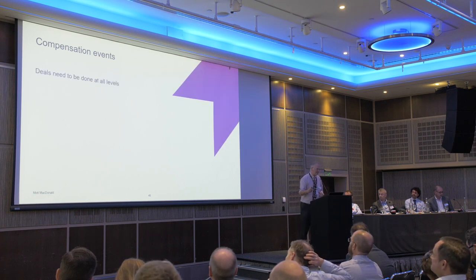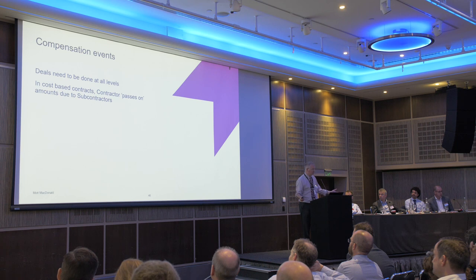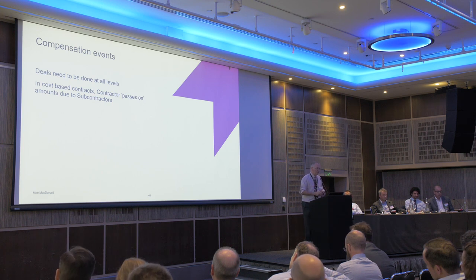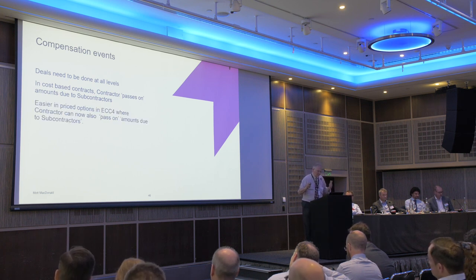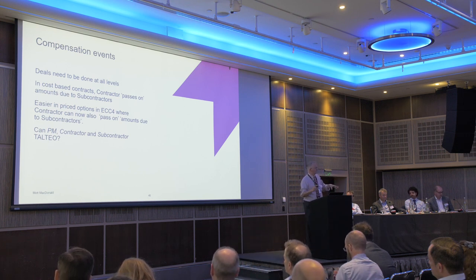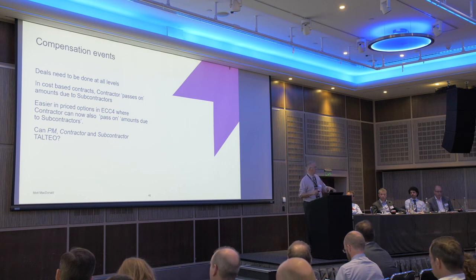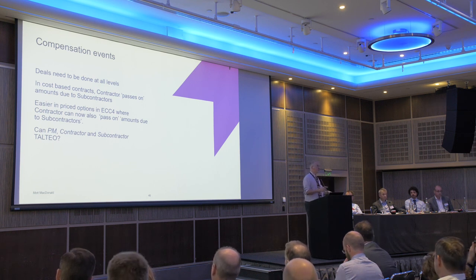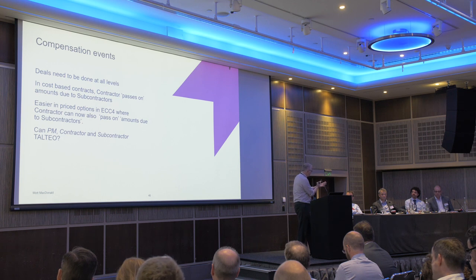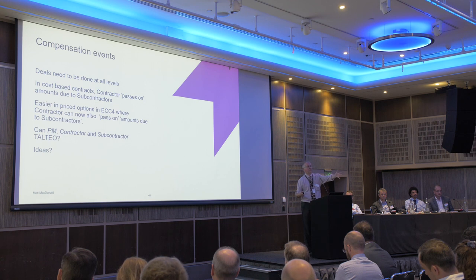Compensation events need to be done at all levels — deals need to be done. There's no right answer to a compensation event; we're doing deals. In cost-based contracts, and now in ECC4 for options A and B too, the contractor passes on the amounts due to subbies. Do we have joined-up compensation meetings with subbie, contractor, and project manager together? Why are we doing it twice and losing messages through mixed communications — just get them in the room together.